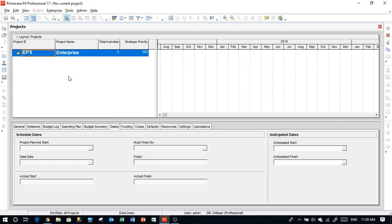You can specify any data related to the EPS and projects. You might have one EPS for your organization — it might be a government, a company, or any organization. Within the EPS you might have one, two, three, or four nodes, and within the EPS there are smaller nodes for additional EPS levels and portfolios. This is the view you see when you open Primavera projects inside the enterprise project structure.